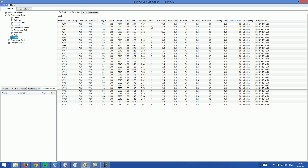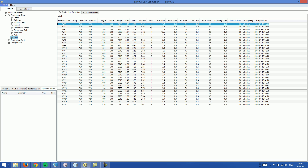There is also the number of elements each element mark generates — in this case, four elements for WP1. The first column is the total time, which is a summary of base time, reinforcement time, costing material time, form time, and opening time.